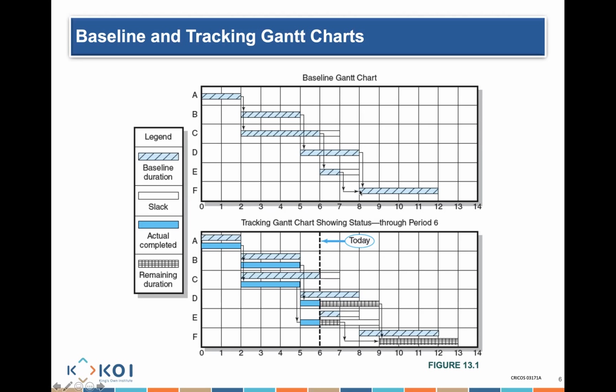So you can see how this graph really shows you graphically how things are progressing in a visual manner, to be able to ensure we are tracking in terms of getting the work completed. In summary, because these tasks are delayed, it's going to take longer. Instead of finishing the project on day 12, it's going to finish on day 13. So there's a clear delay that has been caused by not being able to deliver these items appropriately. Does that make sense?